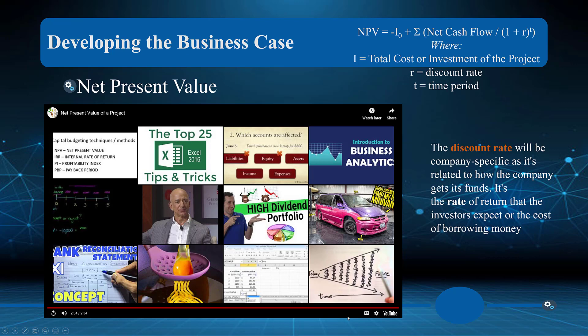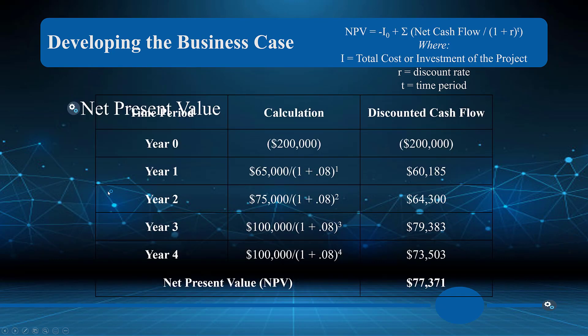Remember, just because a project has a positive NPV does not mean we would take it on. We'd want to calculate the NPV for other alternatives and find the rate of return — it may be that we invest more at the beginning but produce better results over a longer period. IT projects and IT solutions aren't necessarily ones we'd take on just because the NPV warrants it.